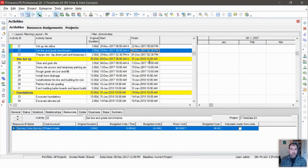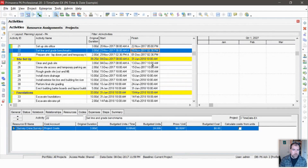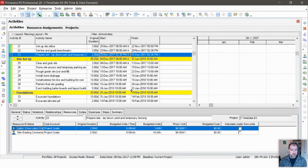That's going to cause me problems. What kinds of problems? This is going to affect my total float — it's going to create fractional total float values. So I might have a float of 1.76 days. It's also going to cause problems with units, like 1.6 hours. You start to get fractional things all over the place, even fractional actual durations.